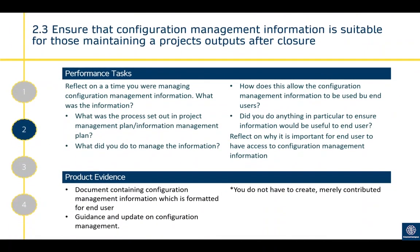Criterion 2.3 is to ensure that configuration management information is suitable for those maintaining project outputs after closure. As mentioned, one of the uses of configuration management information is that after handover — particularly in construction or manufacturing where you're producing physical goods or machinery — people using it after handover need access to this information should they need to make any repairs or replacements. Reflect on what information was provided, what the process was in the project management or information management plan, and what you did to manage the information so it could be used usefully by end users.